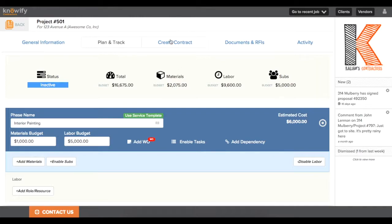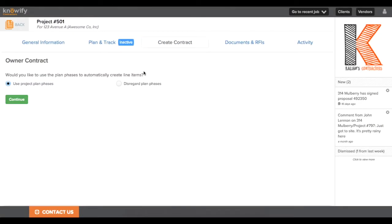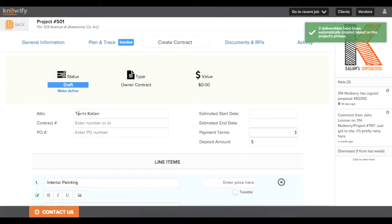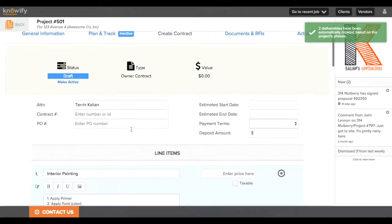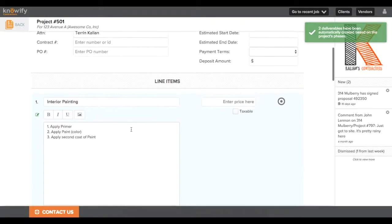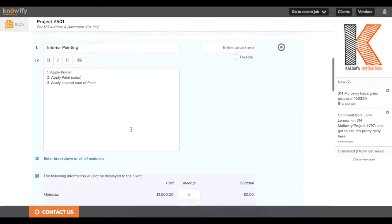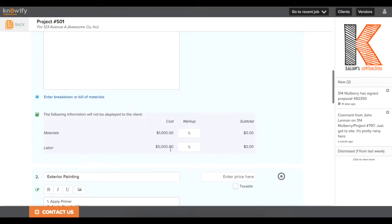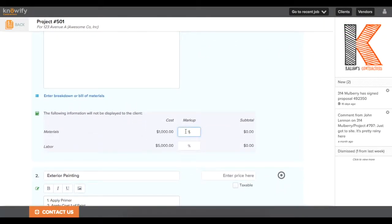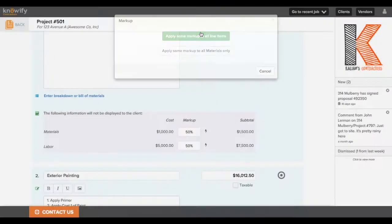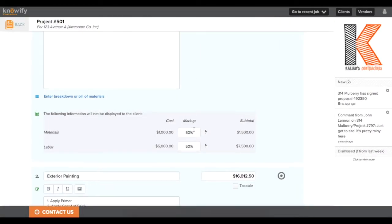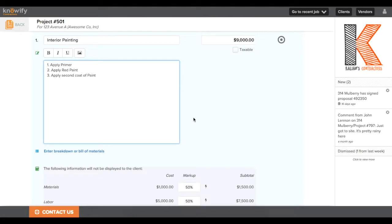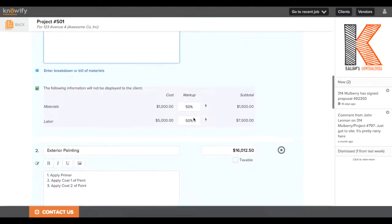Now that we have our budget in the system, I'm going to use this information to create my contract or proposal that I'll be sending to my client. I'm going to choose to use my project plan phases because I want to mark up the estimated cost that I put in earlier. And you see that we're using these line items from earlier in the project plan, and we have the estimated cost from those budgeting values that we used. That way I can just plug in a markup, I'll put in 50%. It quotes all the prices for me. It includes a description on the line so I can make edits here. This pulls right from our work order.